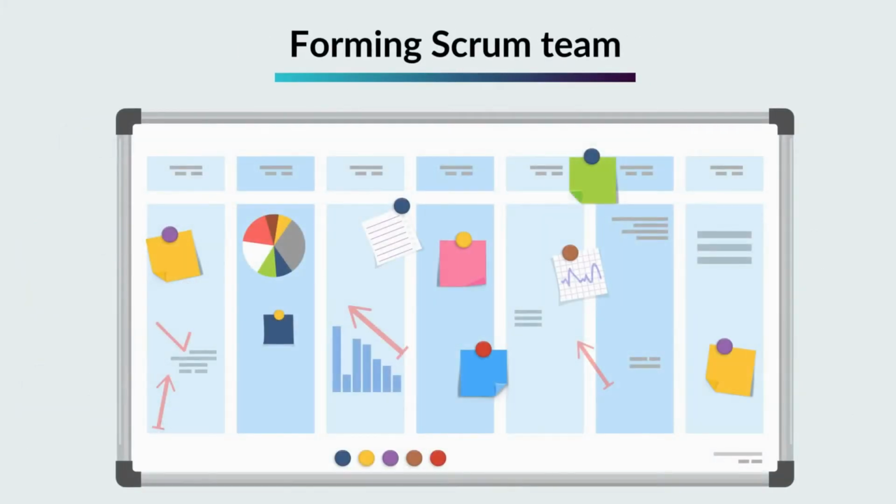Forming a Scrum team. Get the right level of people to accommodate technical and domain experts. Focus on continuity, and avoid fractional assignment of the team to multiple projects, as it may take much time for the team to reassemble the project ingredients again.